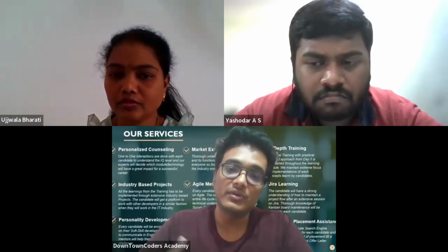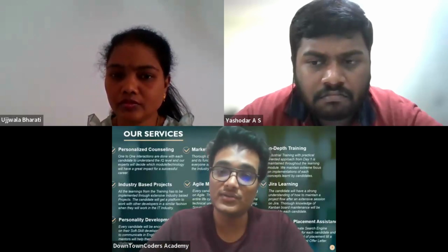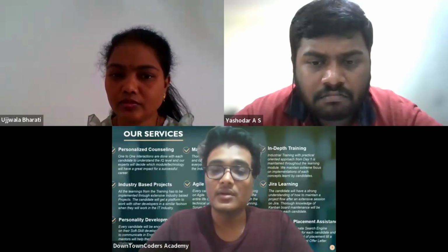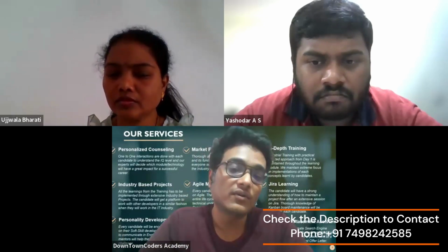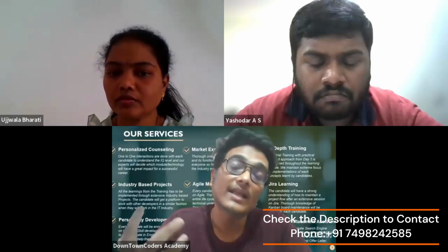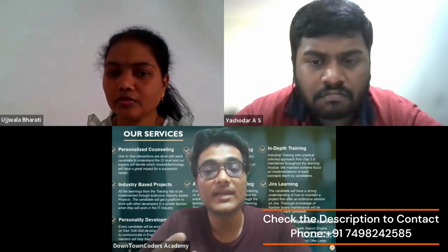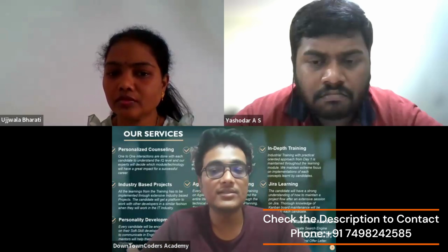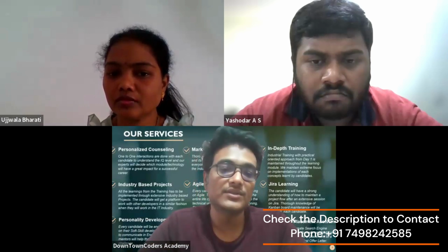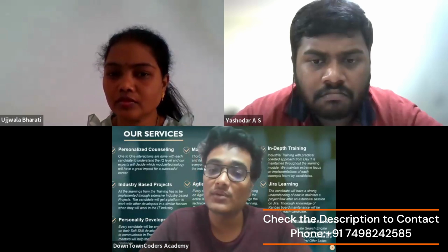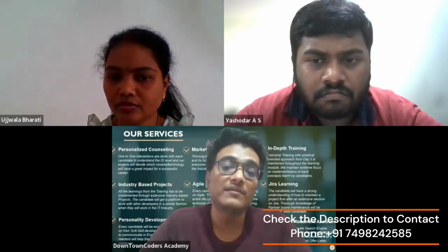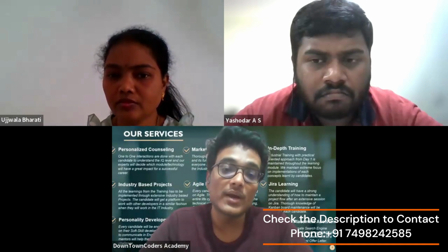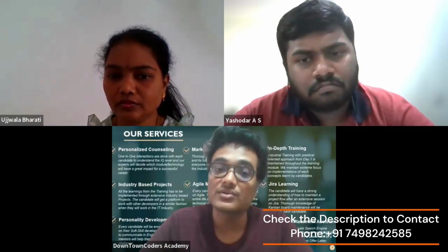Later, we were involved in the analysis phase, or requirement gathering. This is also referred to as the fit gap analysis. The main objective of this fit gap analysis is to understand the business requirement and identify gaps between the standard D365 functionality and the business needs. We conducted workshops with business users to gather the requirements. We identified if the standard features meet the business requirements or if any customizations are required.